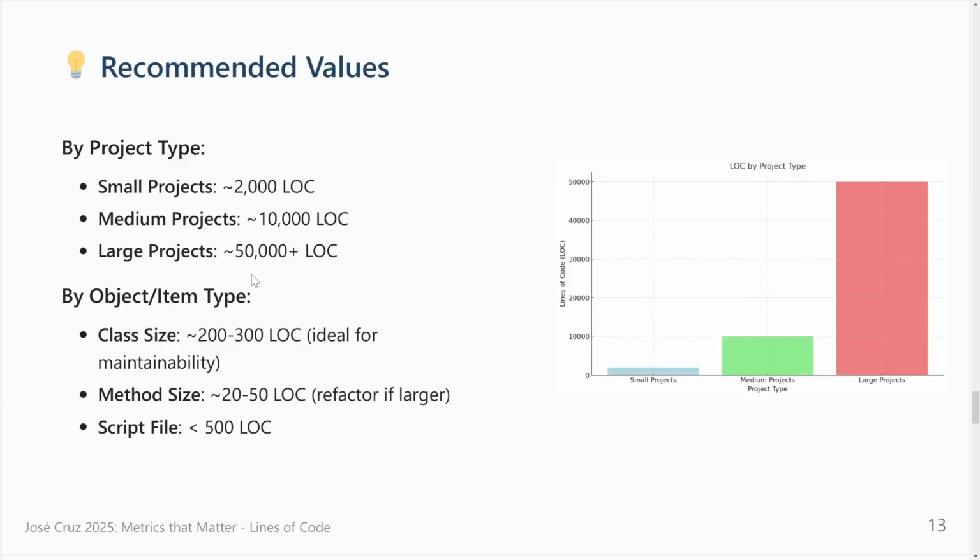But if you are in a company where most of the projects have more than, let's say, 100,000 lines, maybe you want to rescale the way you see this. Maybe in your company a small project is something that starts at 20,000 and a medium one is 100,000, and for the other ones you multiply this by 10 or something, and maybe it fits your scale. So it's on you to create the right scale to later apply the formulas. But the formulas about how lines of code grow still remain, because people are people. It doesn't matter if the project needs 1 billion or 100 lines of code. It's just the same person who works at a specific rate that you want to understand in your formulas.